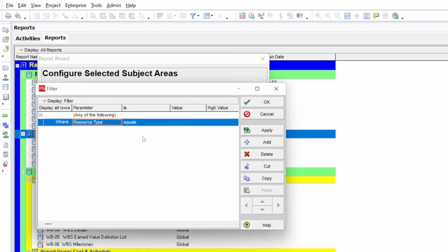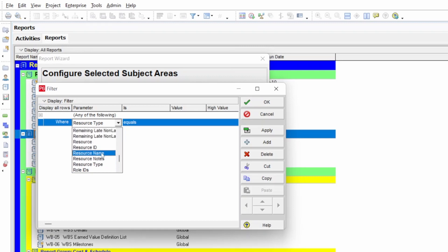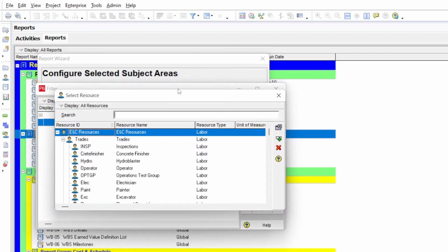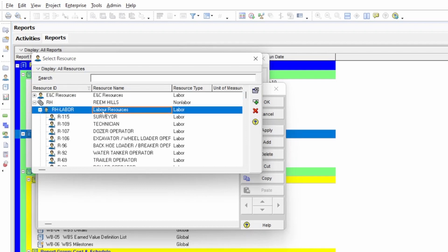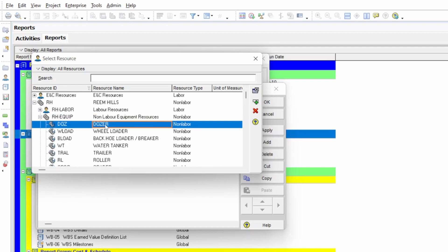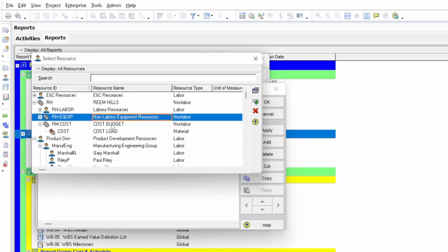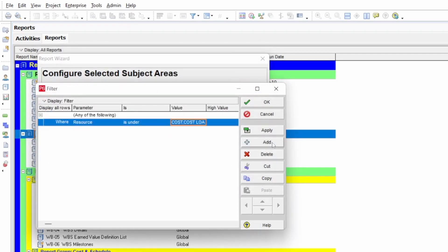Set Resource Type equals 'Non-Labor,' or if you are unsure, you can filter by Resource Name equals a specific resource. When you select the resource, it will open the resource library or resource dictionary. I close the unrelated projects, select my project, and then summarize: under non-labor resources, we have the cost budget. Just select 'Cost' and press OK, then Apply and OK.